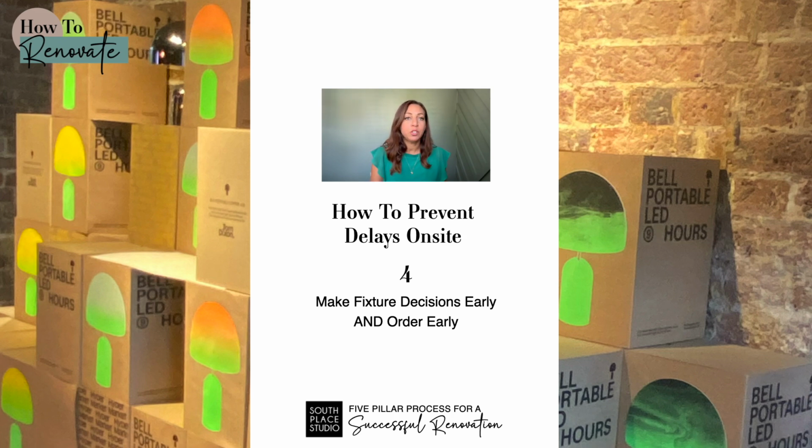It's really up to you to know how long those items will take to arrive, when they will get there, what the lead times are, and also if you know the sequence, you can prioritize. You will know that you'll need your taps earlier than you need your tiles, and you can plan for that, and you can put your orders in so that everything is there and ready when your contractor asks you for them. It's not a big surprise where he's suddenly rushing out of the office to have to go choose taps because he needs them by tomorrow.